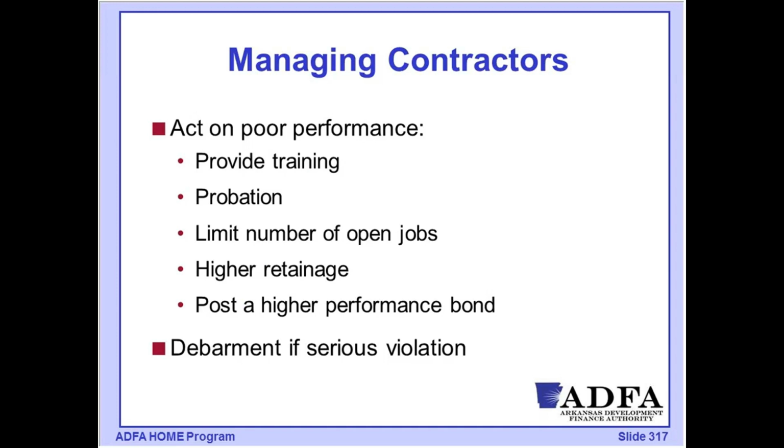In some cases where we have contractors that we're having issues with, we might place them in a probationary status and say, we're going to watch this next one or two jobs and determine whether you're going to be eligible to continue bidding on our program, because we're seeing some performance issues. If you clean these up, you will continue to be eligible to participate. Otherwise, you are going to be excluded. That puts them on notice and hopefully will get their attention to take care of those issues.